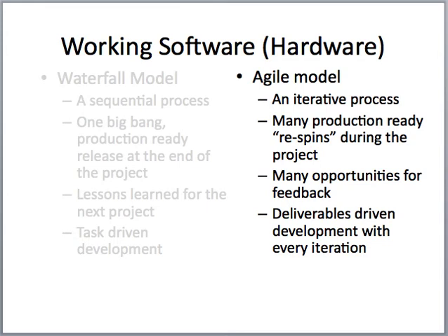Also interesting, specifically for hardware people, is the Agile model gives you the opportunity to walk away with a partially completed product at any time. So you may plan for some massive, earth-shattering, life-changing product to be developed over 2 or 3 years. But then you see, a year or a year and a half in, you have enough of what you need to go to market. So you quit. And potentially that's the type of decision that you could be making every 4 weeks or so.